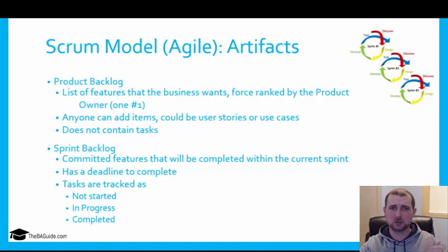Where the product backlog, there's no deadline, it's just an ongoing list. And there may be features that are put in there, and quite frankly, there will be, that'll never be realized. They'll just keep dropping to the bottom of the list, and they'll never be put in because it's a good idea maybe, but it's not really very useful, or the return isn't very high, and so they get lower priority.